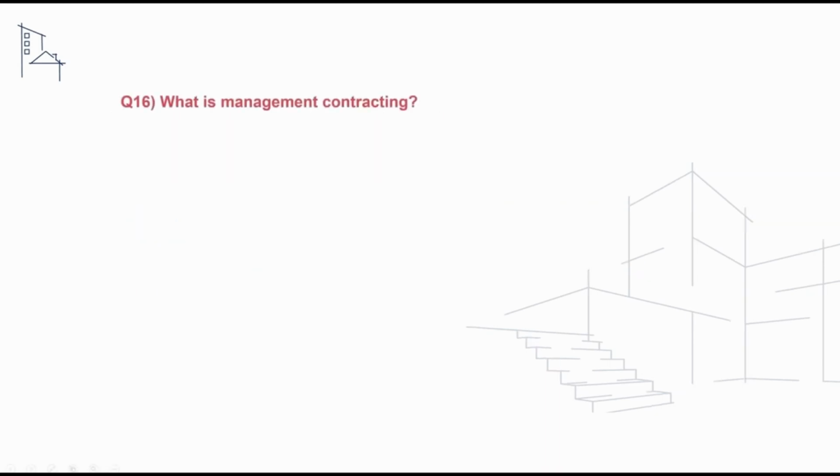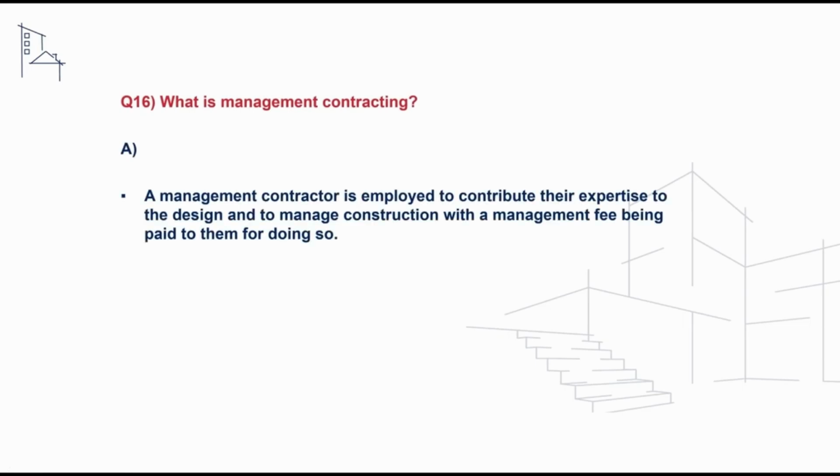The next question we'll take a look at is what is management contracts in procurement? And to address this, we can say that this is where a management contractor is employed to contribute their expertise to the design and to manage construction, with a management fee being paid to them for doing so.